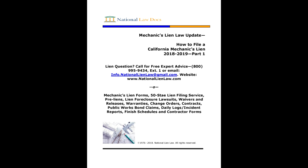Technically, on foreclosure, the trade fixtures can be sold off and removed from the property as long as it does not cause material damage. The good news is that in almost all long-term commercial leases, there is a clause that says it's a default if the tenant allows the mechanics lien. This in turn puts pressure on the tenant to pay because the landlord will start screaming at them to make sure the balance is paid.